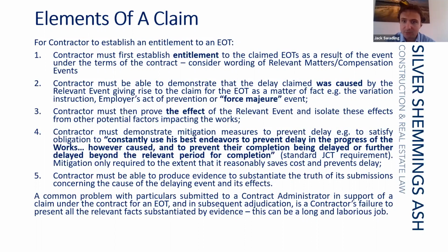This is often the most significant challenge, and the position of the contractor will often be determined by the quality of the evidence it can produce to show the effects of the relevant event on the completion date, and site records are of paramount importance for these types of claims. I suppose that probably goes without saying.